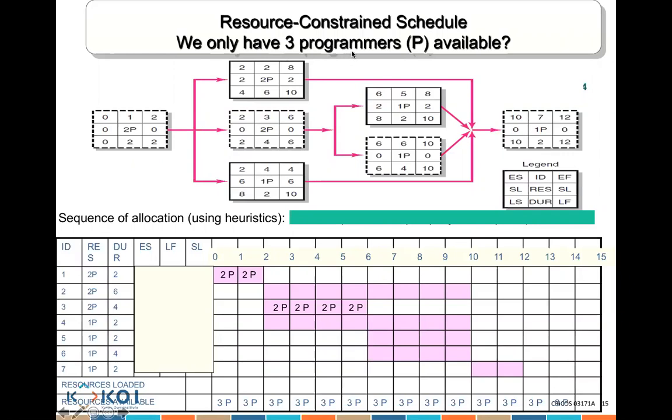Right. And because of that, we use this one because this requires 1 person. Yeah. And we require using that 1 person for 2 days. It could start in day 2. And that's why we said we can't start this activity here, but we could start this activity here because from day 2 to day 4, 1 person and 1 person. Okay. Does that make sense?